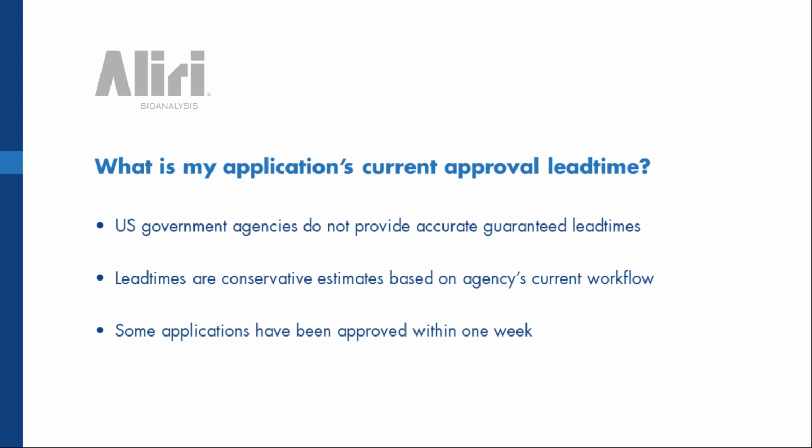Some applications have been approved within 1 week, and this has been when we're faced with a really critical project that has a really tight turnaround timeline. I've been able to call some of these teams at these government agencies and explain to them that we are a pharmaceutical research laboratory and that these samples are part of a really critical project for drug approval. And they will oftentimes understand that, and they will bump us to the front of the line.